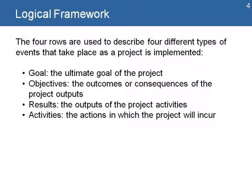The four rows are used to describe four different types of events that take place as the project is implemented. We have the goal — the ultimate goal of the project. Objectives — the outcomes or consequences of the project outputs. Results — also known as the outputs of the project activities. And the activities — the actions in which a project will engage.